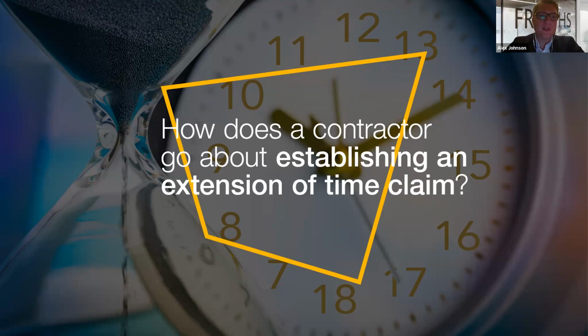So to establish that an event caused critical delay, the party needs to show the critical path of the project and explain the events that caused delay to the critical path. In most cases, parties will rely upon expert evidence from a scheduling delay expert to conduct that analysis, and lawyers will establish which party was responsible for the events that caused the delay.